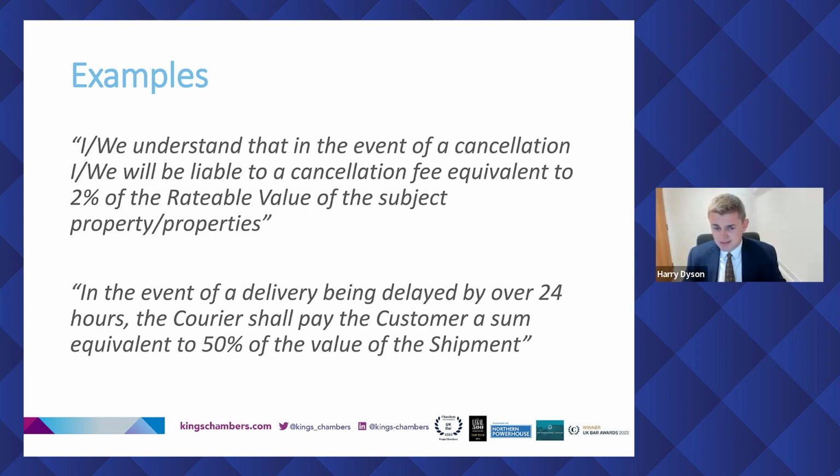As you might expect, 2% of the rateable value of a property is a significant amount of money, and in this case, it was significantly more than the full contract price. From memory, it was something getting on for double. It wasn't a crazy sum of money, but it was almost double what the full contract price would be had the claimant actually gone ahead and done all the work.